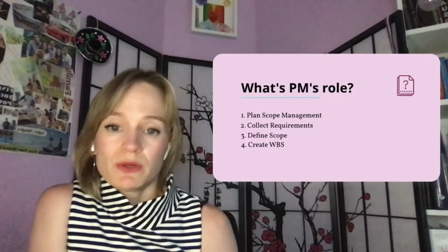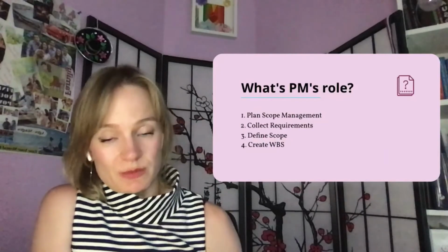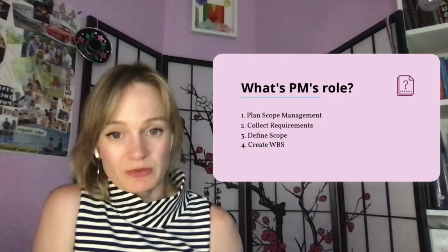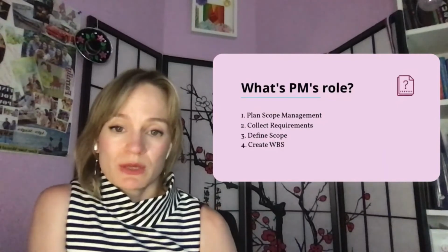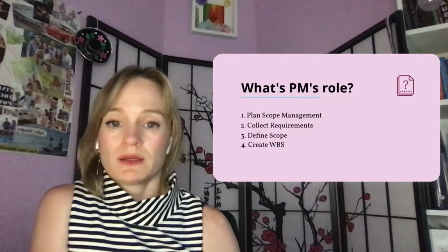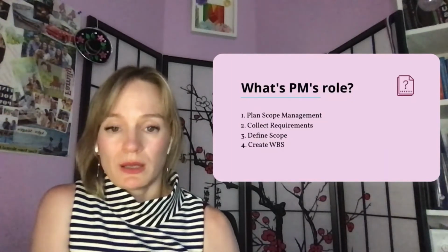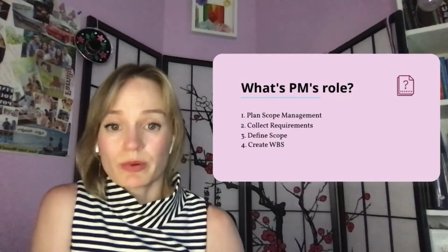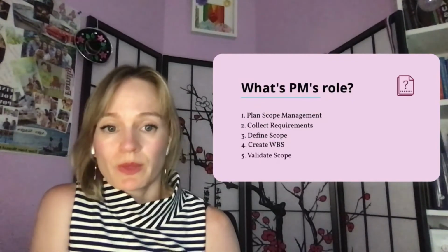This is where the project manager breaks down into smaller steps all those higher level steps that we discussed in the beginning, right? Like making the dough, breaking it down into steps like add flour into bowl, add water, add egg, mix it all together, knead the dough. That will be the work breakdown structure for our pizza project.